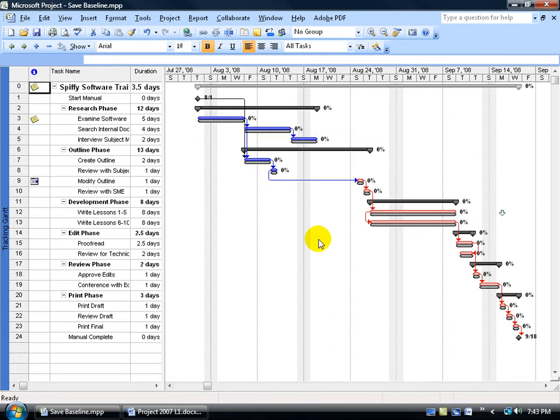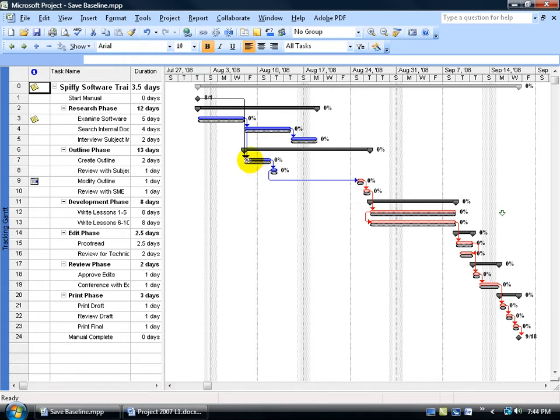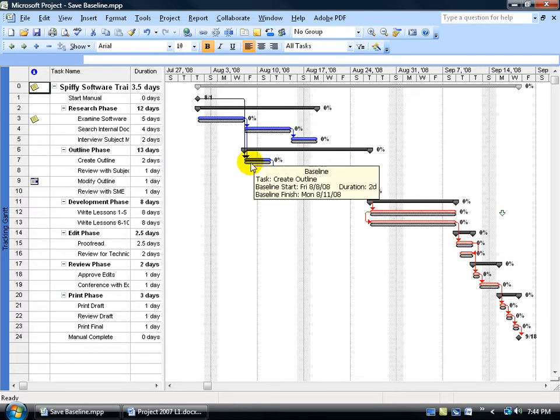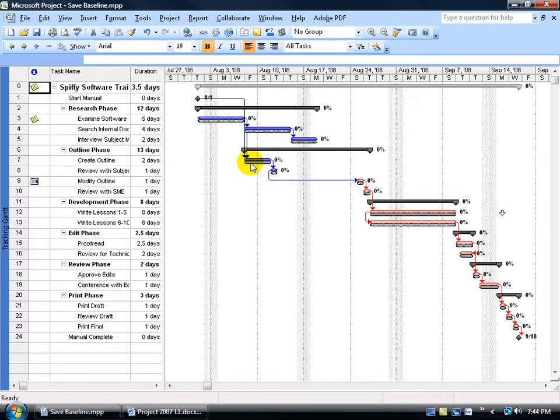Now, you notice that you have a couple of different colors here, but one consistent color on all of these tasks is the black bar. That's your baseline. If you make changes throughout the project, like for example this task right here, let's say that you delayed or pushed out a couple of days, it's going to slide off of the baseline bar here. So you can come in here and say, OK, blue has now moved over a couple of days, and the original date or the baseline before we start the project is this date right here, and you can hover over that to get the original dates or start and finish dates for that task.